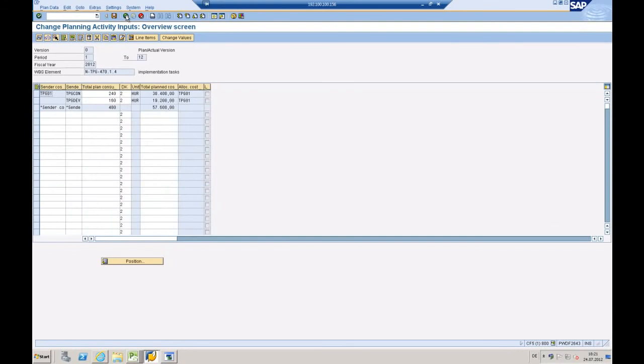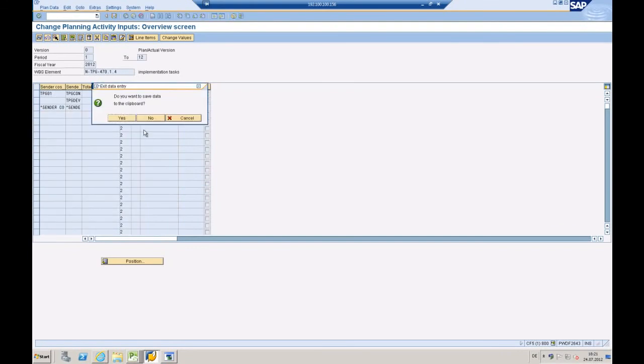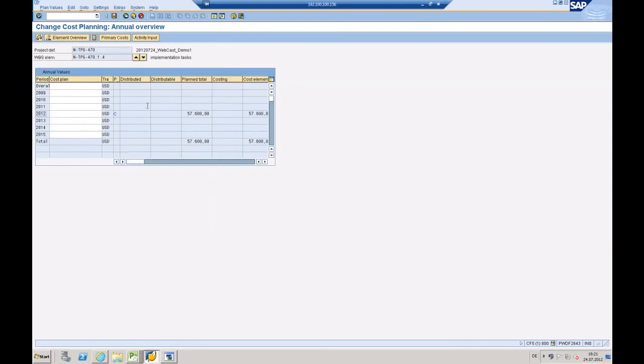Now this is exactly what people want to see in SAP, and this information can be taken as an input for your budget planning. This is how customers usually use this information. They collect the forecast from all the projects. Usually this is done by a nightly job that runs over the projects and posts some baseline into a version, which will be used later on for defining the budget maybe for the next year or reforecasting for the quarter, whatever it is. It's very, very useful information used by most of our customers in this case.